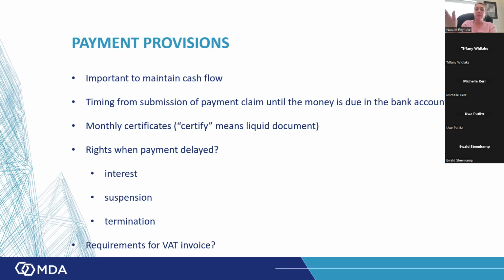And I think on the payment provisions, the only thing that I want to say in terms of this clause is what I've seen that causes issues, is when people just go and stick in an invoice, a tax invoice clause. They literally write something that doesn't even speak to the rest of the clauses in the contract, and they say, contractor must provide a tax invoice and then payment will be 30 days from invoice. Okay, so how does that link to the issuing of the certificates? And how do we fit it into the fact that you have to assess my claim within 28 days of the payment claim and issue the certificate?